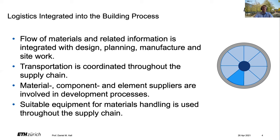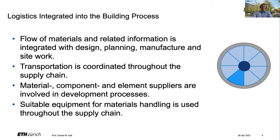Third, the material component and element supplies are involved in the development processes. This means that you actually understand your supply chain in the development of your products. The simplest example: if you are going to use a volumetric modular approach, those large modules need to fit on top of the size of the truck or lorry that you need to deliver the modules. So you have to think about what size you can design for within your transportation system.